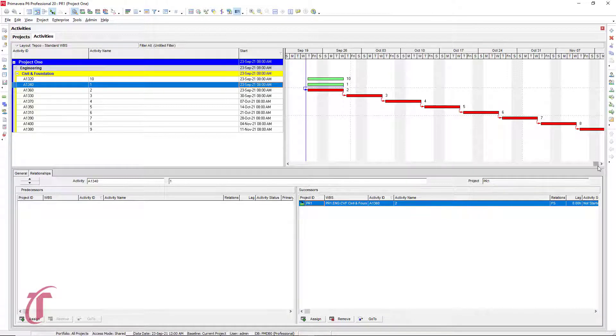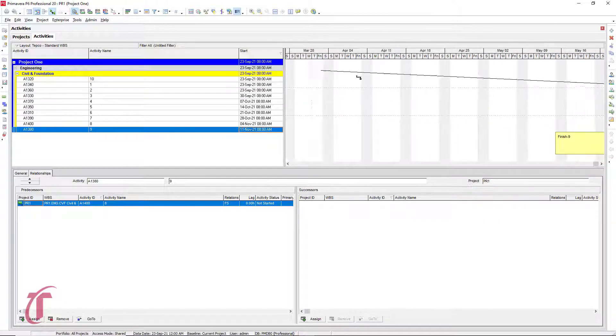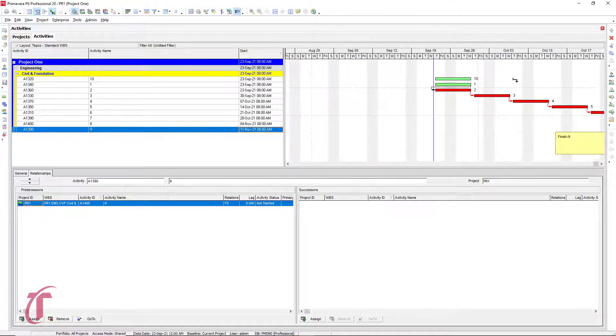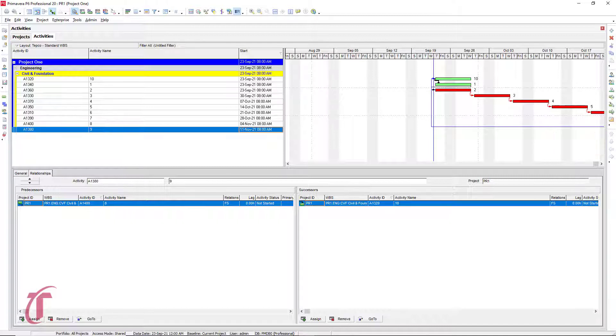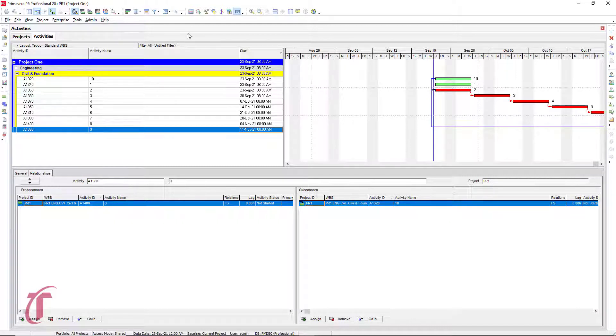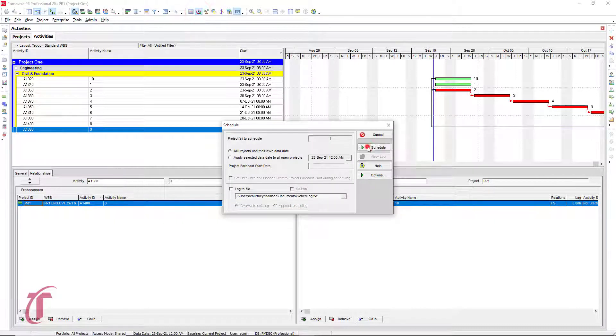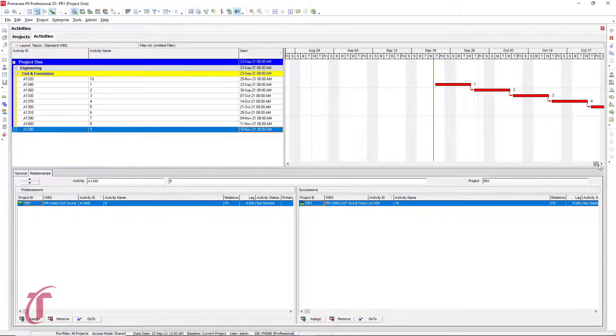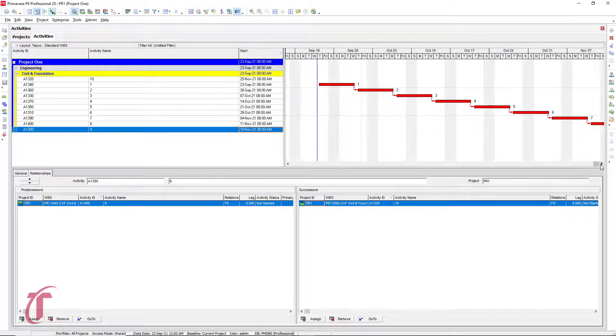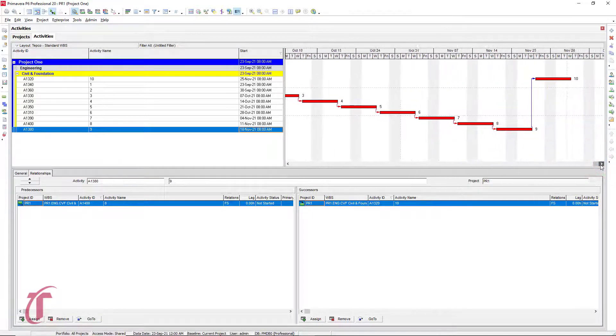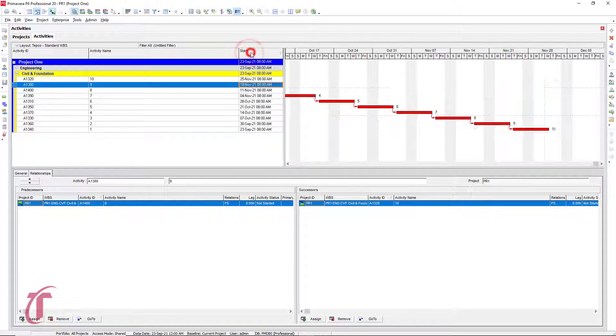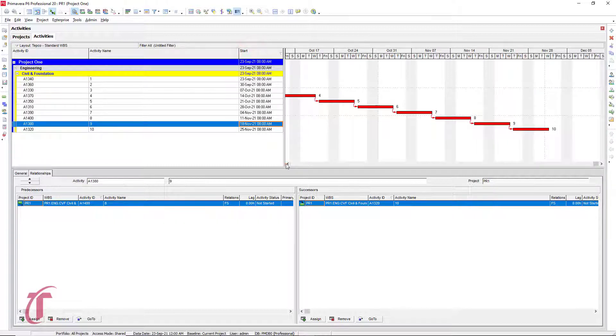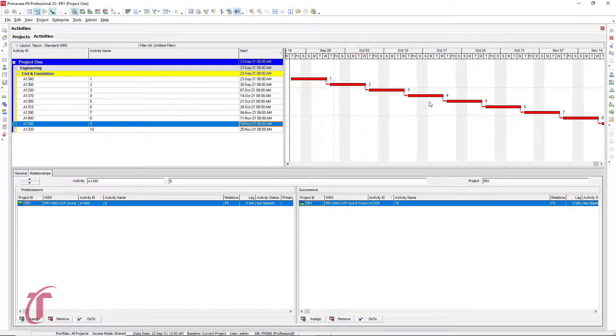And then to link the other one that we have, we need to take nine and scroll over here. Once we finish nine, we want to start 10. So we see that box right there, finish nine before starting 10, we can release. And so again, we can hit F9 to schedule or select the icon at the top. And so again, we see that we have all of our activities going in sequential order. We can sort by start again to give us that nice waterfall effect.